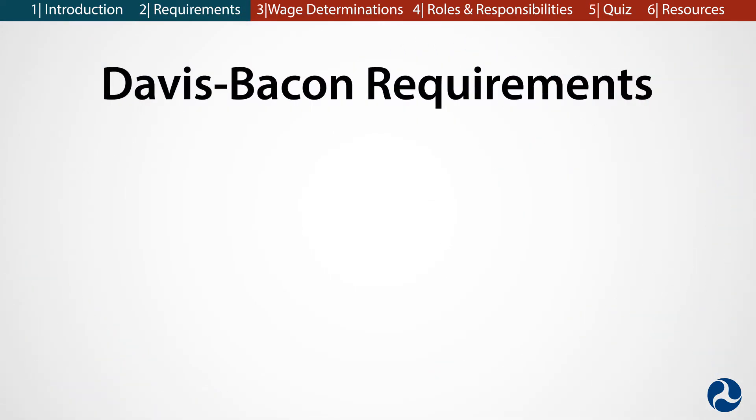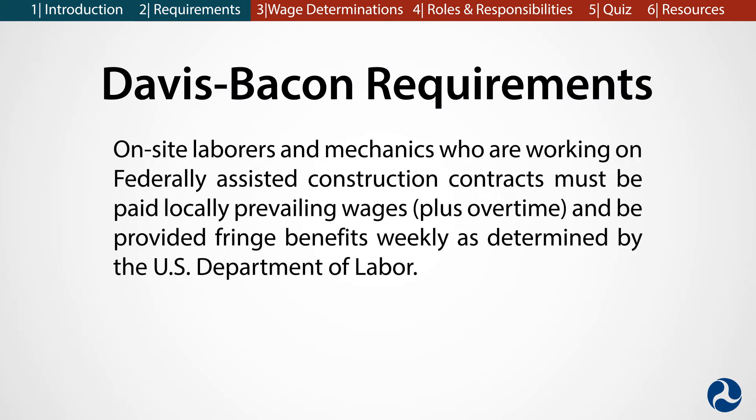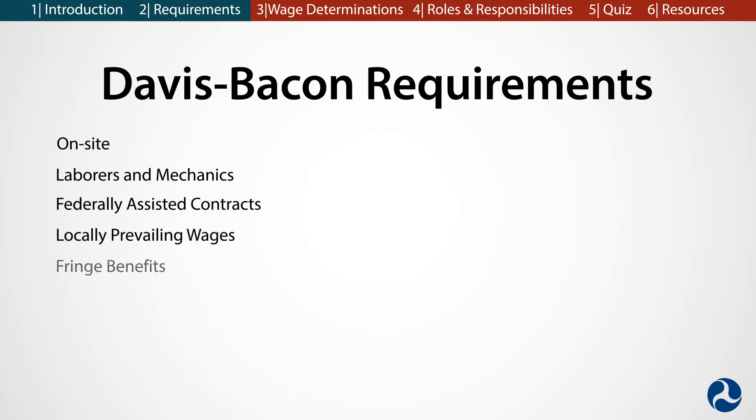The DBA can be summed up in one sentence. On-site laborers and mechanics who are working on federally assisted construction contracts must be paid locally prevailing wages, plus overtime, and be provided fringe benefits weekly as determined by the U.S. Department of Labor. Let's break this down piece by piece and go over each of the key elements.